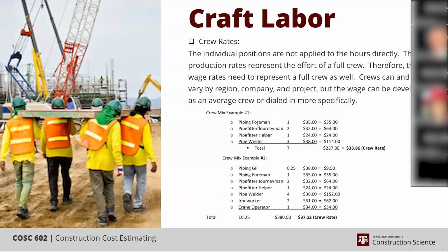We didn't have general foremen at Cajun. We had a superintendent run the job site and foremen down, made things happen. But our average job was $3 to $5 million. Meanwhile, we use a lot of general foremen, and general foremen are considered craft. Superintendents are considered staff and supervision. So that's the breaking point. So general foremen down are in our crew mix at Black and Veatch and Fluor. So you can see the difference in the structure, but the principle is the same.